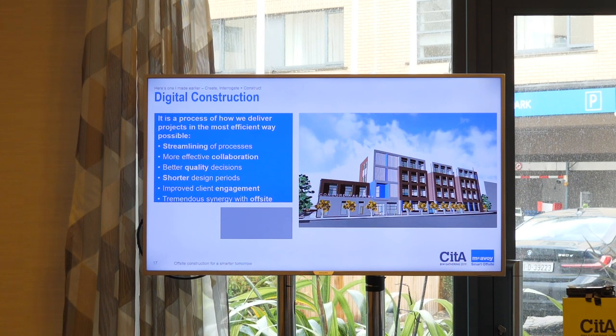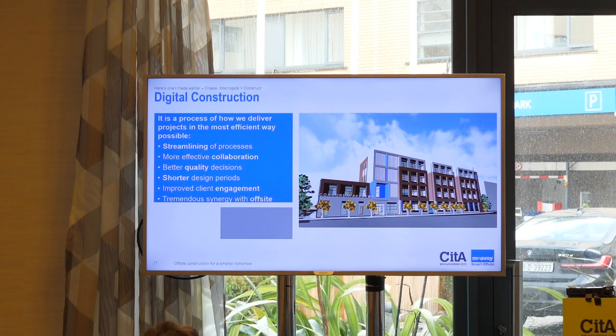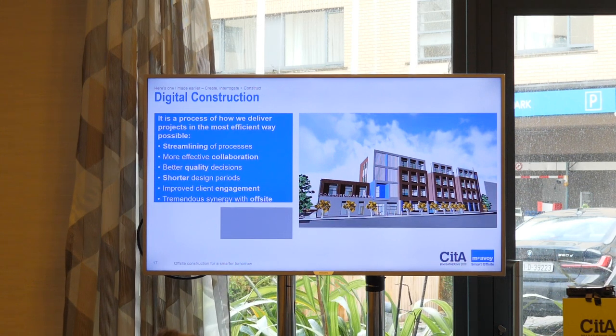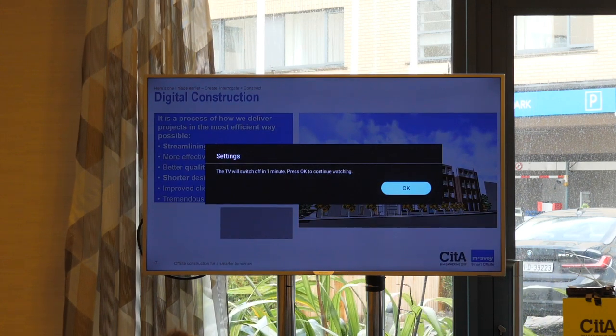What I think people don't appreciate about off-site construction is that the minute we start on site, we're also building in the factory. We're not starting just with the ground floor; we're building the ground floor, the first floor, the second floor, all simultaneously. So as soon as we start on site, our design...